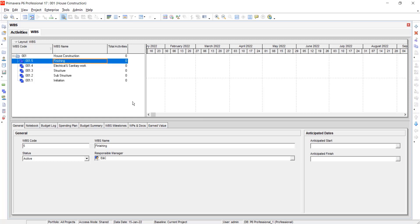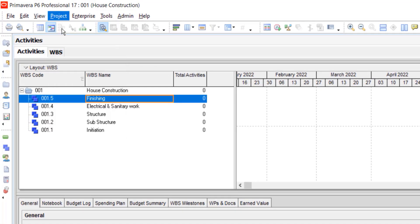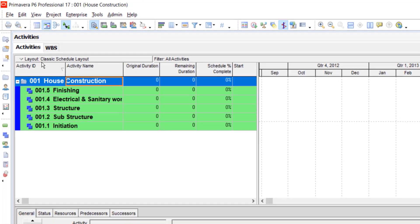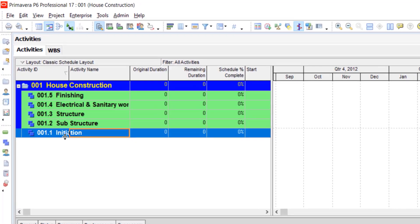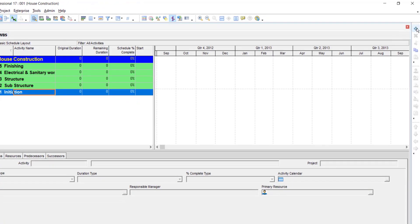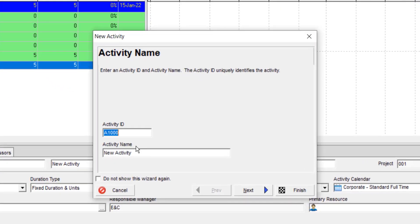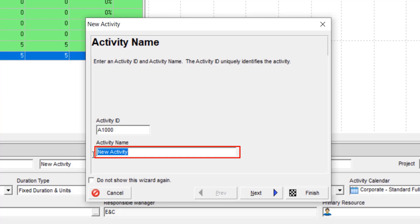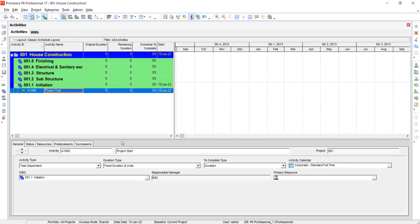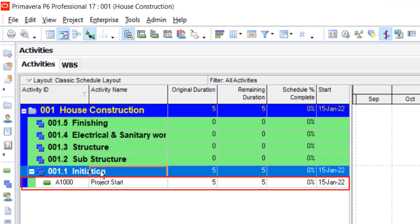For this purpose, go to activities. If it is not displayed, go to project, select activities, and the activities will be displayed. So for each WBS, assign activities. For example, for initiation, want to assign an activity, that is project start. So click on the initiation WBS and click on add. Now do not disturb the activity ID. Just change the activity name as project start. And then click on finish. Now the activity for initiation has been assigned.